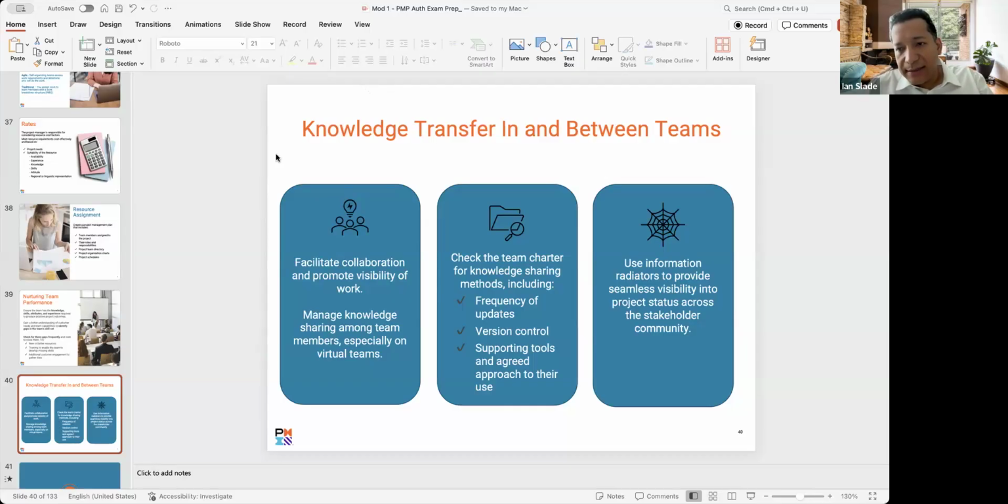First one is within the team, right? They're just amongst yourselves. The second one is between the different teams doing the project. Again, the DBA team, infrastructure team, you're sharing. And the third type of knowledge transfer is for those who've completed a project that's similar to what another team is about to embark on, right?